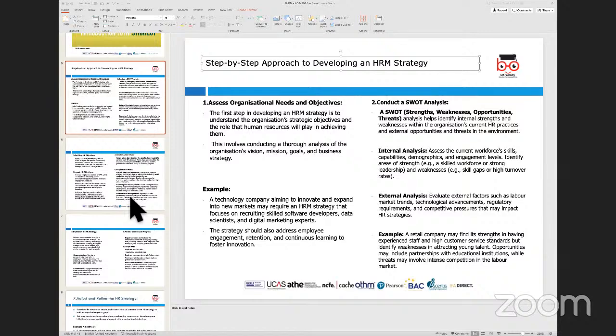And at some stage, at the end of it, if the implementation has come to an end or if the implementation is not going smoothly, then you also look at evaluating any obstacles or hurdles which are coming across in the implementation of that plan. In some cases, you would need to go back to management because there are financial obstacles, or if the costs are increasing over what has been budgeted for, you would go back to the management and seek further approvals and things like that.